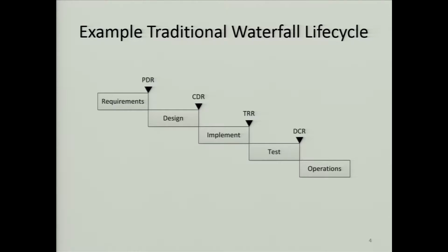We saw in a couple presentations earlier today the problem of the escalation of cost if we find problems in software, particularly in requirements, as the life cycle proceeds. The standard that it goes up by 10 for each life cycle stage is probably not true, but it does go up a lot for each subsequent life cycle stage if you don't find a problem early in the life cycle.